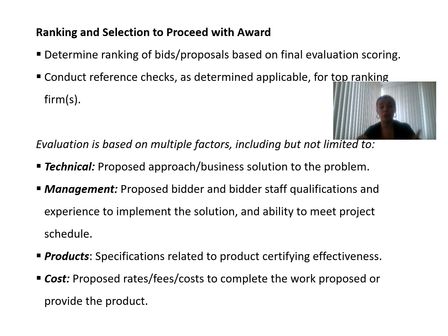Then you go through the reference checks because you ask in the RFP for letters as references of the work, and then you add that to the score of each proposal. At the end, the evaluation should be based on these multiple factors. Technical: how close is this bid, how it complies with the approach of the business solution that is being looked for.